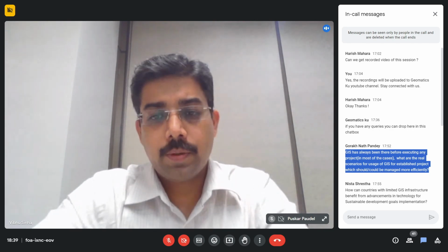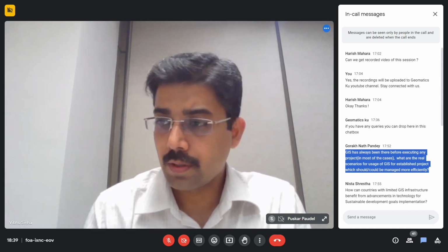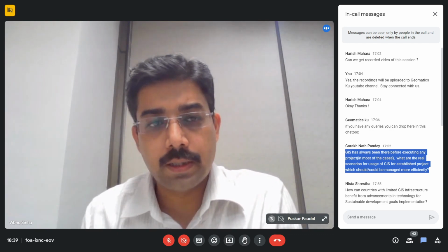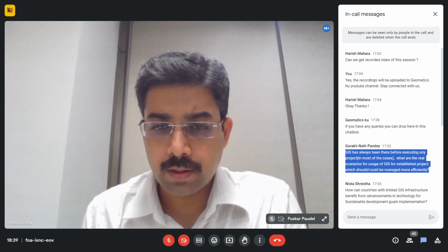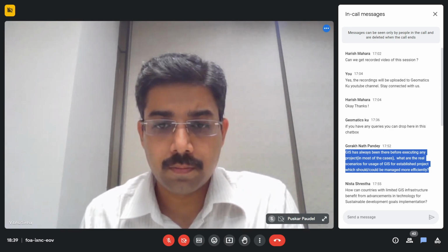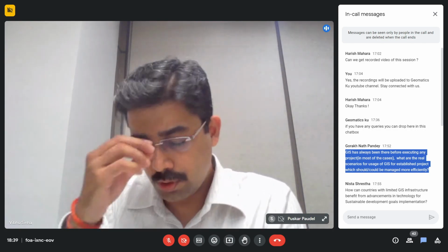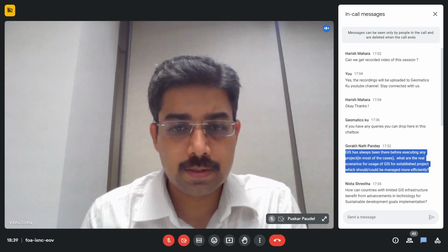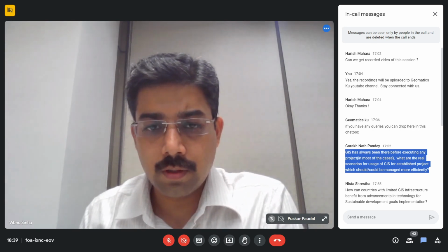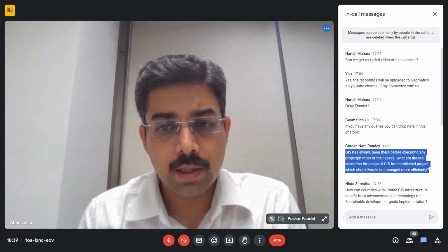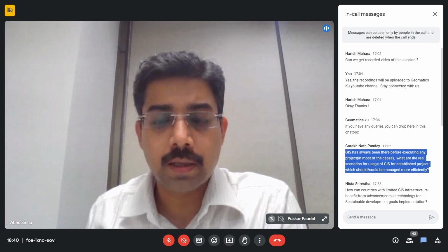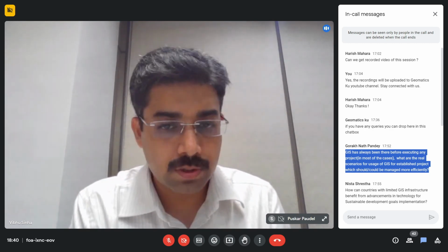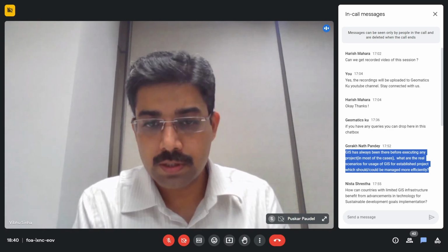And then during the execution, typically it would be contracted out to someone who is going to do it, as we call them, EPC contractors. These engineering, procurement, and construction contractors carry out the work. They map the work which is being done. They provide timely updates using photographs. Those contractors are duty bound to upload the area which has been constructed using GIS. In almost all infra projects like roads and pipelines, and in the majority of areas, a drone survey is mandatory these days, and the drone survey results are laid out on the plan. So you have a plan brief, and then you have a data set coming in from the contractor and the drone surveys, so you are able to see whether your project is on track or not.